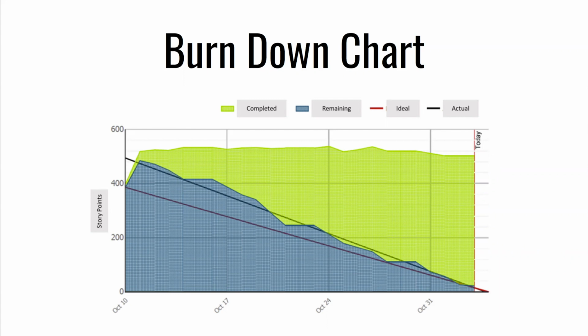But what I wanted to show you with this graph is that A, you can generate the data in different ways, but B, this is what a mature team's burn down looks like, regardless of the weeks or how many story points. You can see that the actual line trended very close to the ideal line in terms of the way that we work. Some ups and downs. You have weekends in there. You have different things going on, right? Those little flat bars are the weekends over a 4-week period.